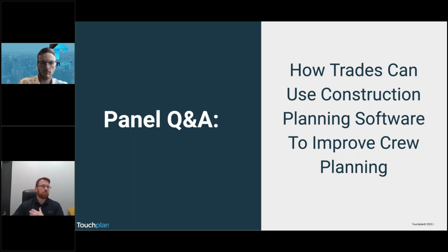And we do that with the exports, and then we can do that visually as well. But visual is mostly for our field guys, and the exports are more for tracking change, which has been really, really helpful to get things done, because they can see very quickly it's going to come down to impacts. You're impacting our ability to finish this in the time frame that you say, and we can show you why. And then having that record over time is going to carry a lot of weight towards the end of the job.